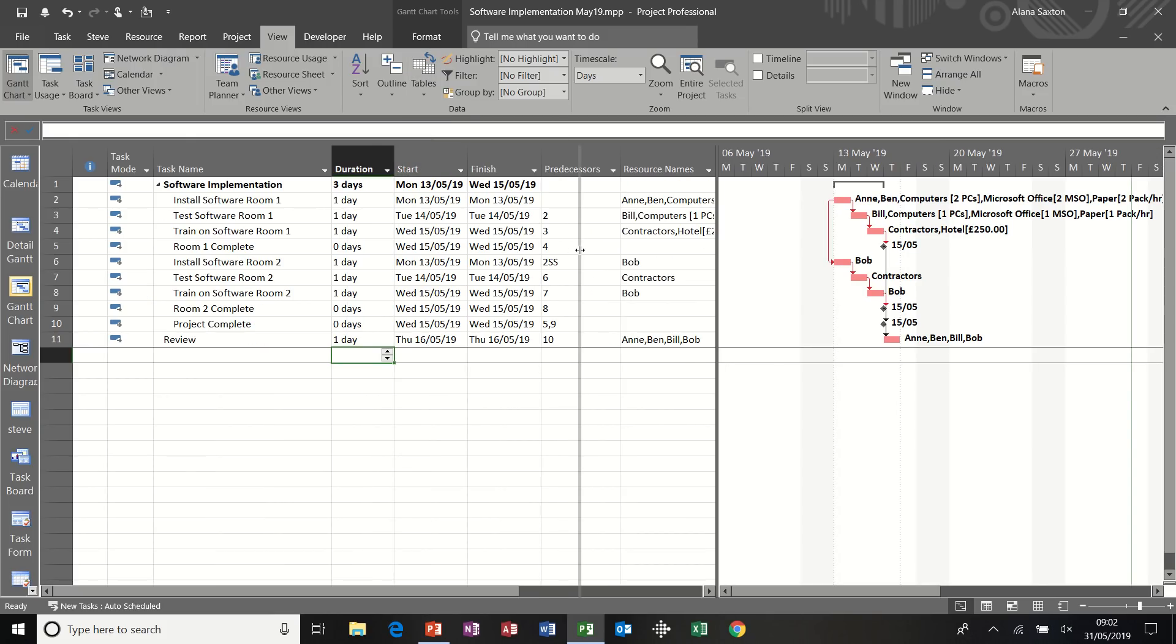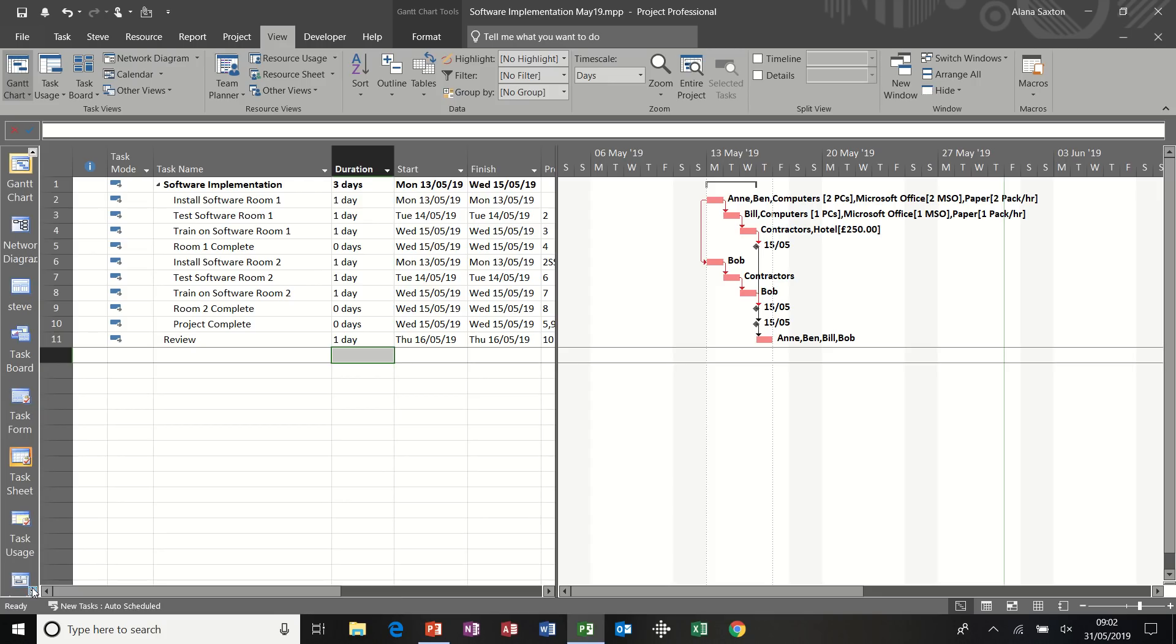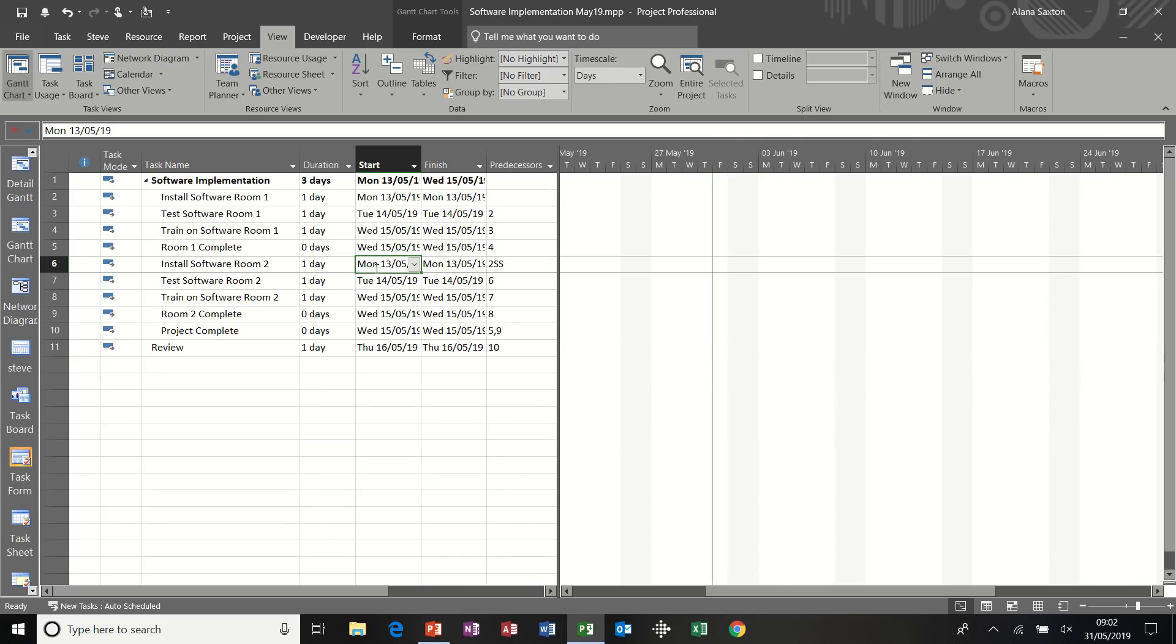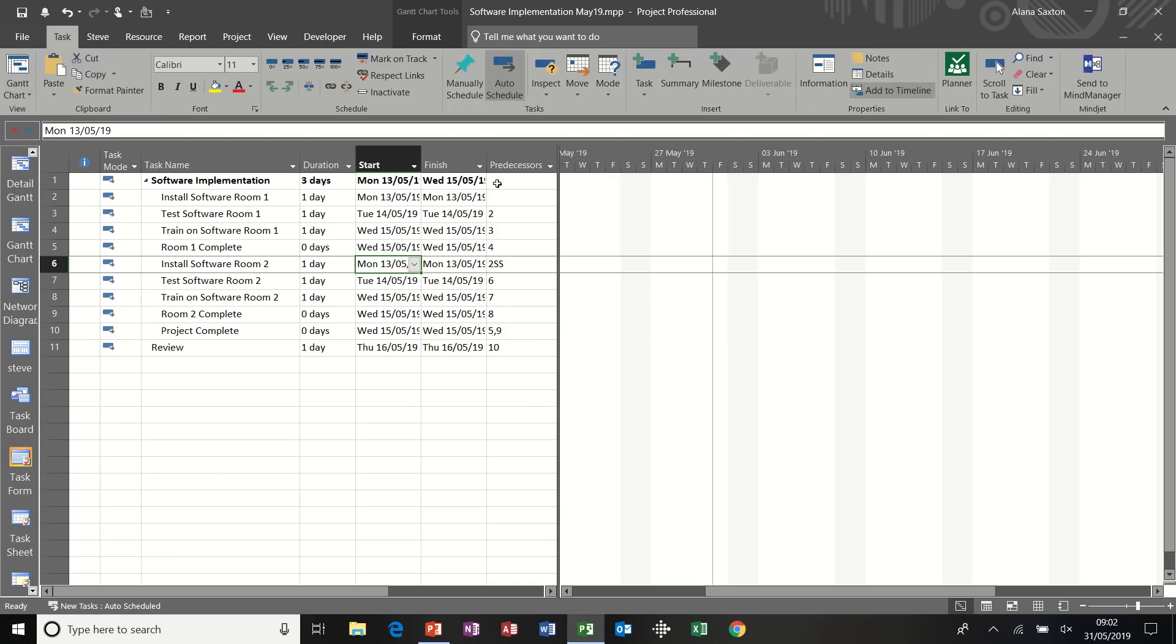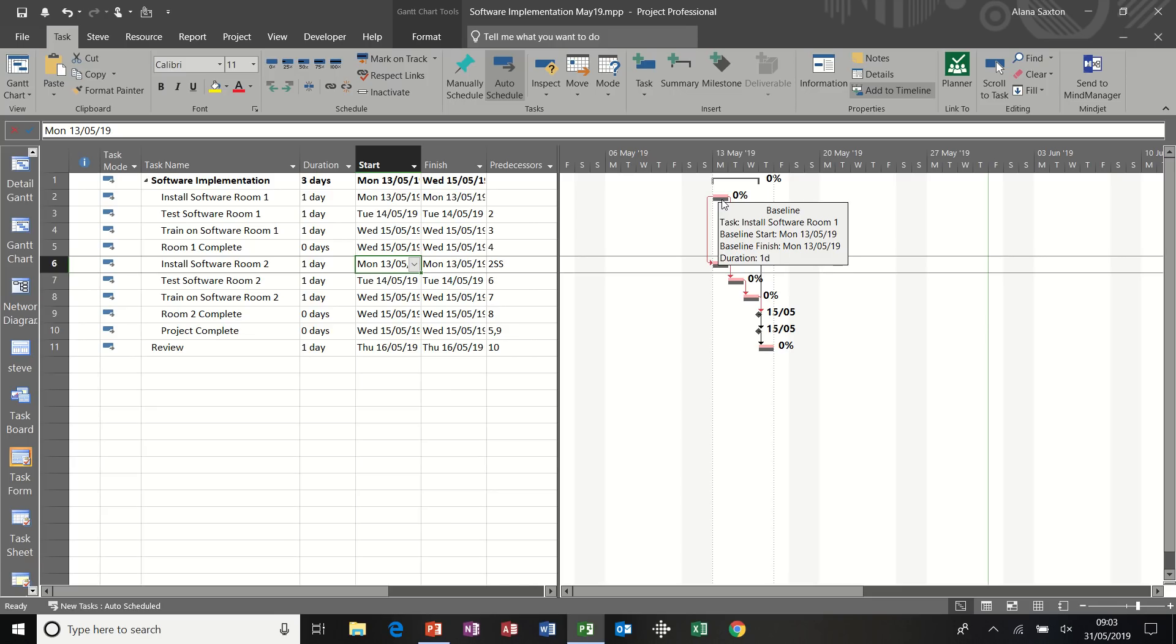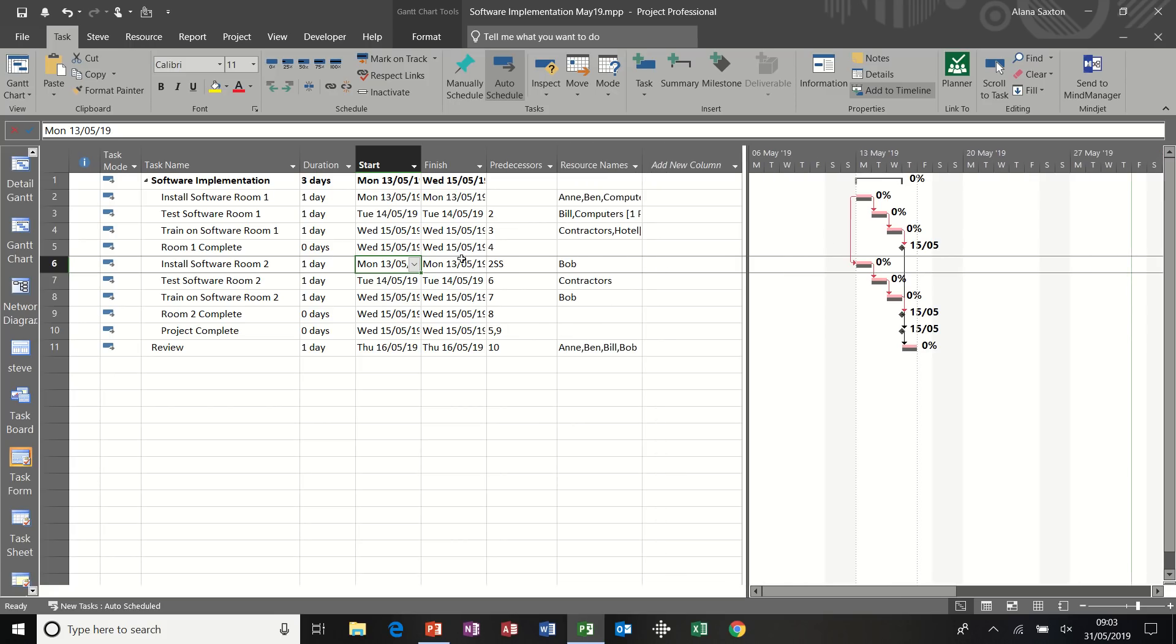Now what I recommend people do is not use this default Gantt chart while you're updating the project, but go on to the tracking Gantt, which can be found down the view bar on the left hand side. Tracking Gantt and then modify this table to show the tracking table. Now, before I do that, I need to bring my tasks back into view. So on the tracking Gantt, you can see you have a percentage complete as a label and your baseline is shown by this charcoal coloured bar. Your actual is the red bar. So I'm just going to move this across just to expose more of the table. So I want to change this table to the tracking table. So I'm going view, tables, tracking.